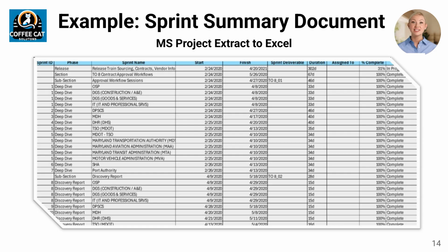Some Agile projects develop a full sprint plan. This image is an extract from a plan that was used to estimate the project's overall timeline, effort, staff resources, and cost across all sprints. For the plan to provide value, it requires that you decompose stories to the task level and have work efforts, along with start and end dates for each task.